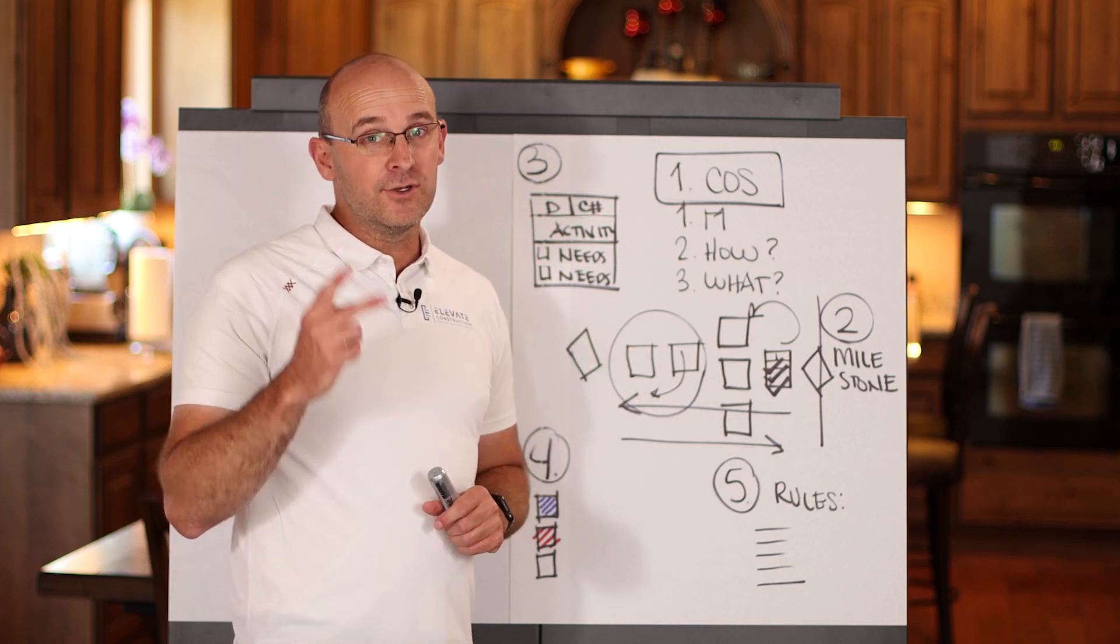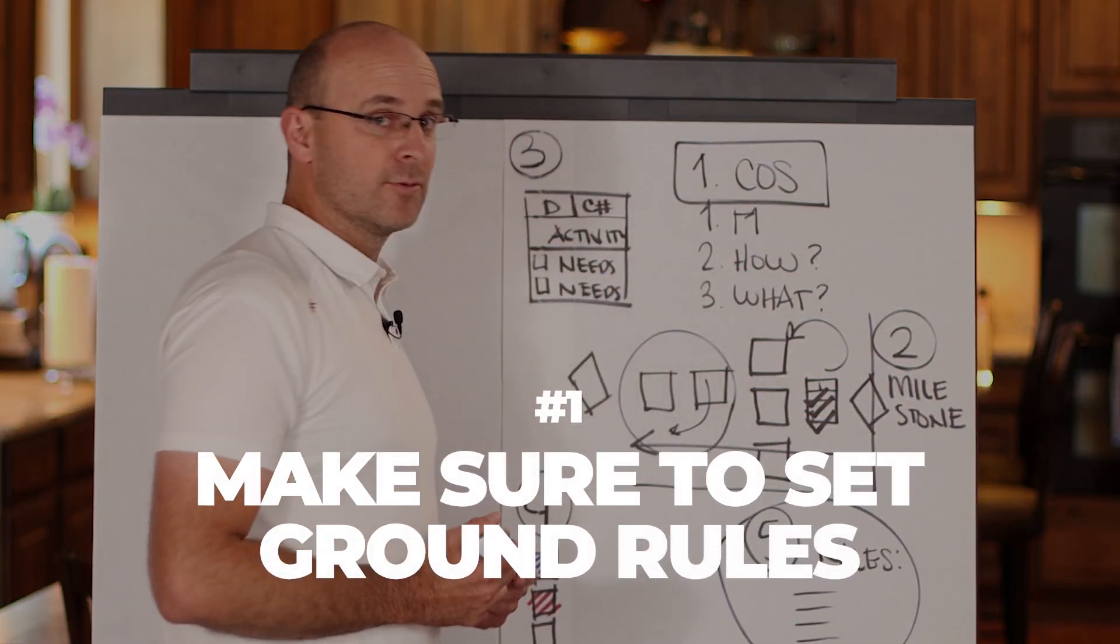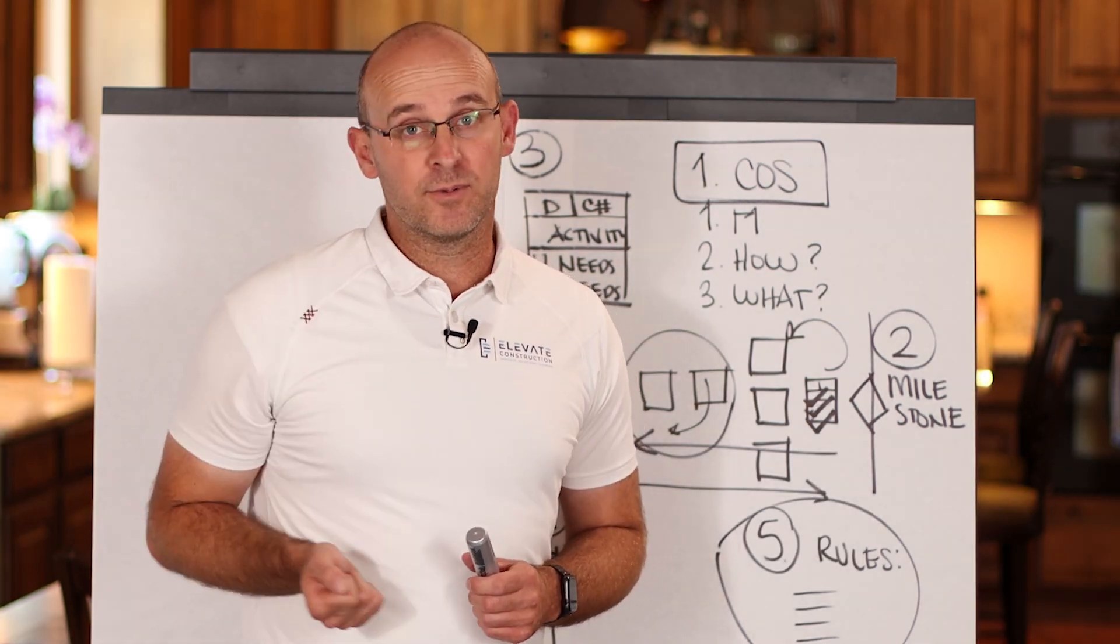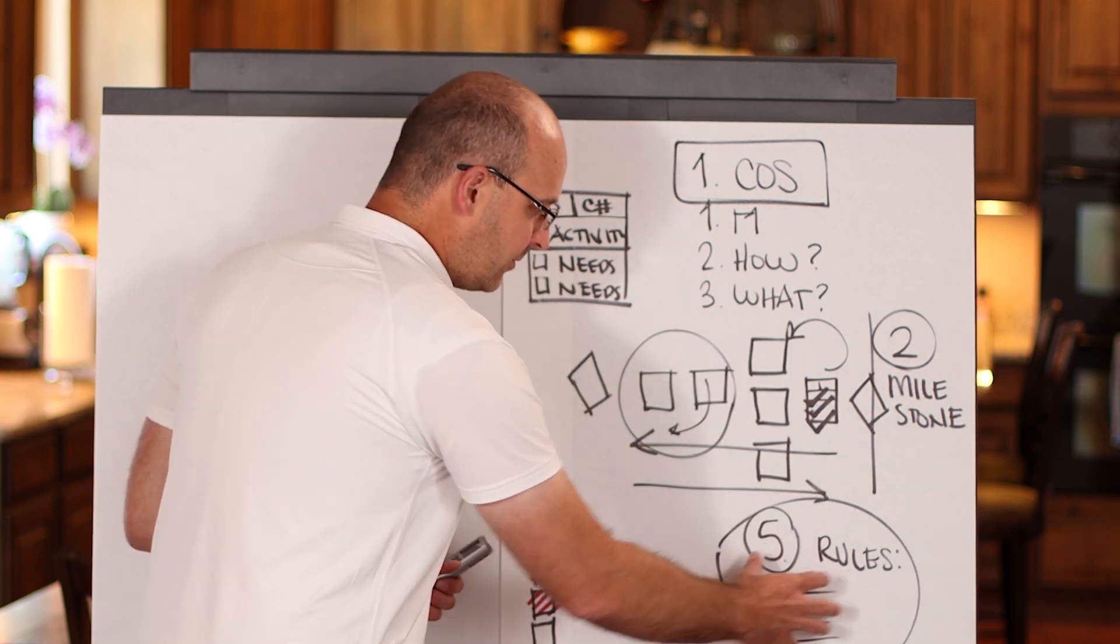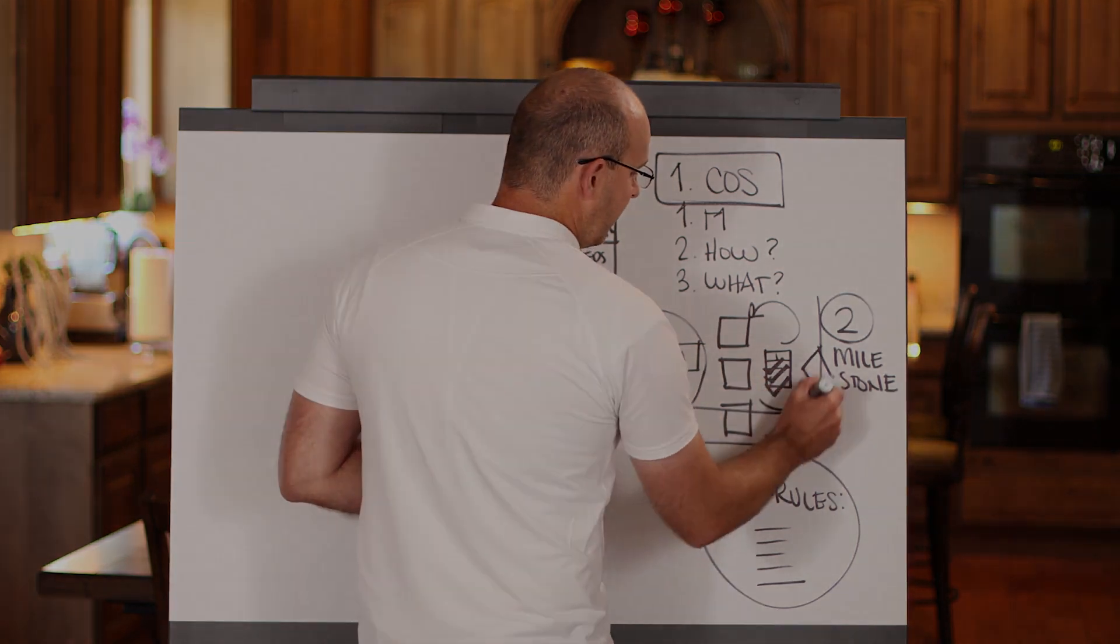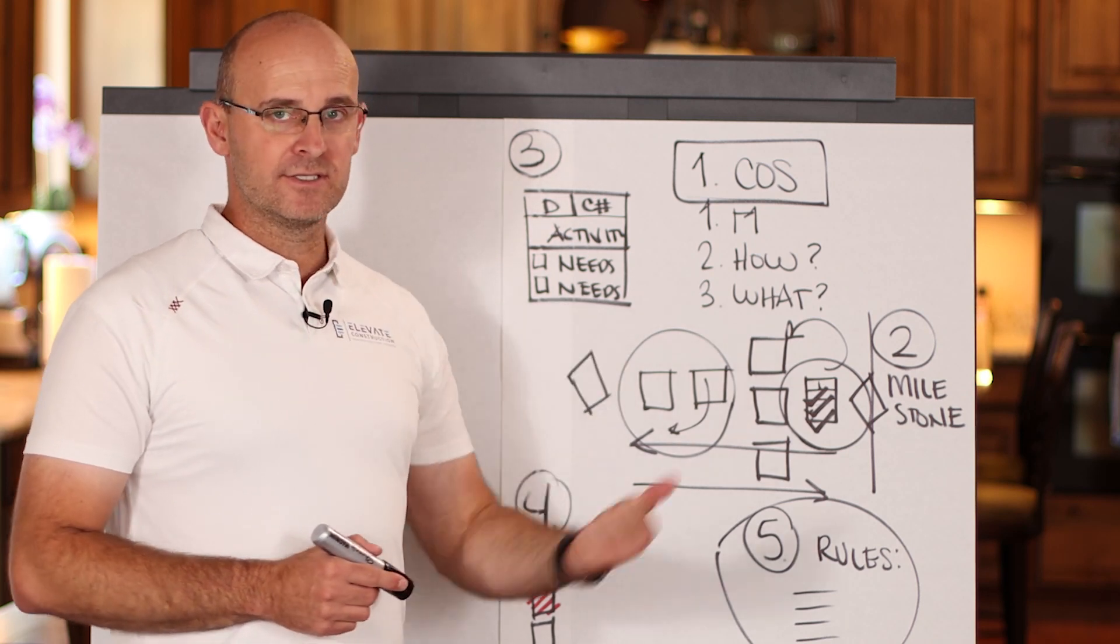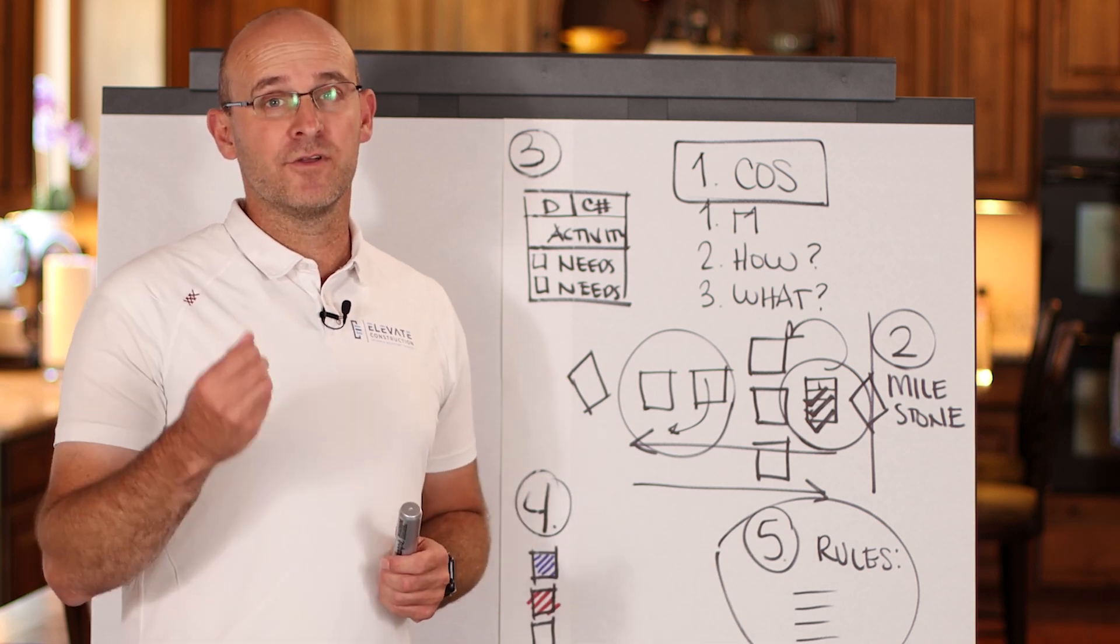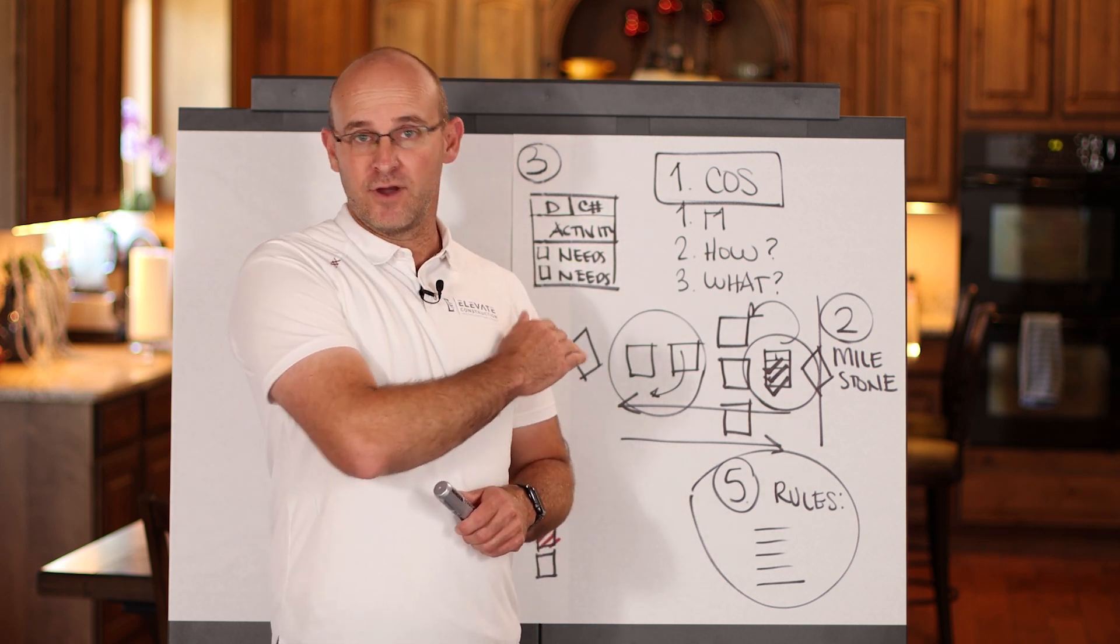I told you I would tell you the two key things with this that would keep you safe. The two key things is making sure that you set ground rules. You might hear things like don't touch anyone else's sticky, only one person speaks at a time, ask for what you need, the typical pull planning methods. If you get everyone on the same page, it'll keep you safe and you won't have dissension in your pull plan. The second thing is following very strictly the system that I've given you where you checkbox in the reverse based on needs. You will have this pull plan done in an orderly and stable fashion and you will not feel frantic or intimidated. I promise you. So those are the two key things that I highly recommend for every pull plan.